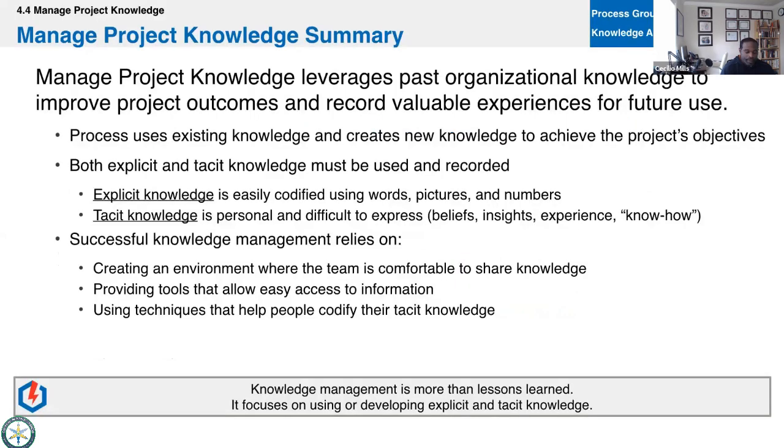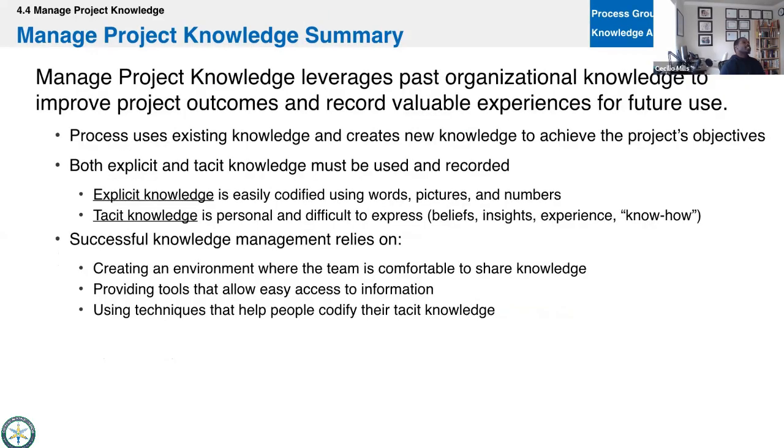All right, let's look at manage project knowledge now. New process, John. This wasn't in version 5. This is the idea from PMI that as the project is happening, all the stuff that's going to eventually become an OPA, these lessons learned, stuff that's happening on the project, people who are getting trained and learning new skills, using new contract types, having new vendors make it to the preferred vendor list, all of this knowledge needs to be circulated definitely throughout the team, but also for the organization.